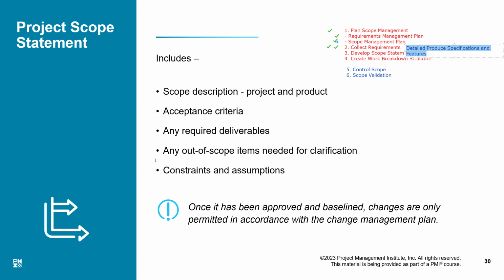They are included in the scope, and these things are not included in the contract. They are outside of the scope of this project. For example, you asked me to construct a house. I am constructing your house, but then you tell me that I have acquired extra land attached to the house, and please do the lawn in that area for me as part of the project. That is out of scope.